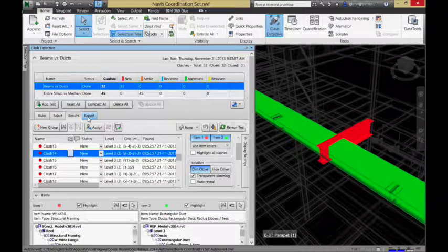If I have a whole lot of clashes between framing elements and ductwork, I could think about moving individual little pieces of ductwork, or I might need to be thinking about a whole different strategy for fixing that. Maybe I need to be rethinking my structural scheme or the floor-to-floor space. There's some issue going on there, and really it's only the expertise in the room that's going to help figure that out. The computer just reports what it sees.